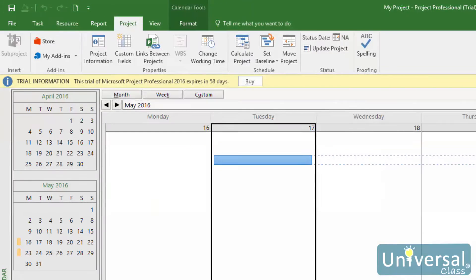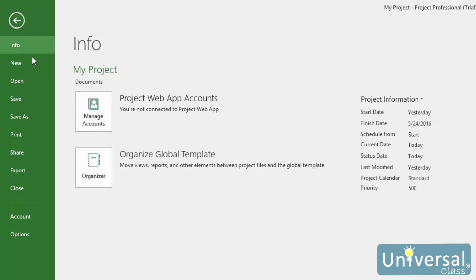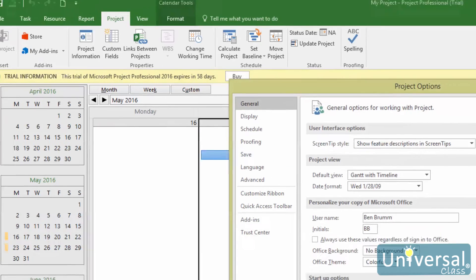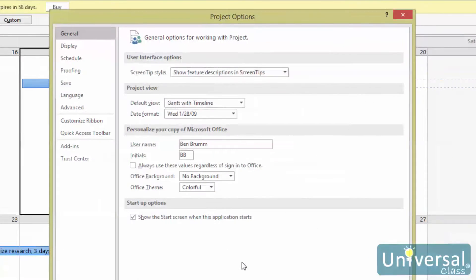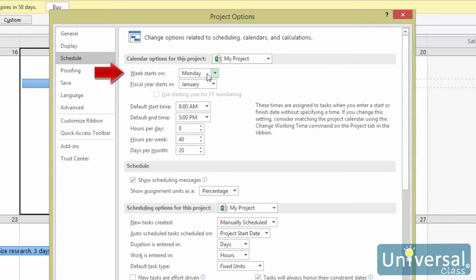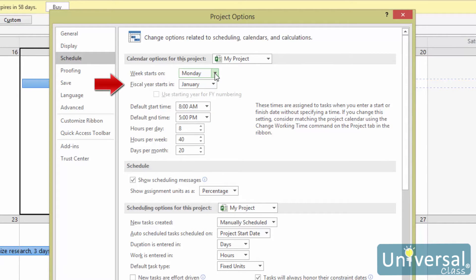Next, let's learn how to set options for the calendars you use in Project. To do this, click on the File tab, then select Options from the left in the backstage view. In the dialog box that appears, click Schedule on the left hand side. To change the day that the week starts on, go to the week starts on drop down list and choose a day. If you want to change the start of the fiscal year, go to the fiscal year starts in drop down menu and select a month.